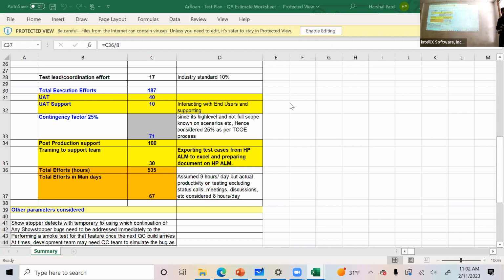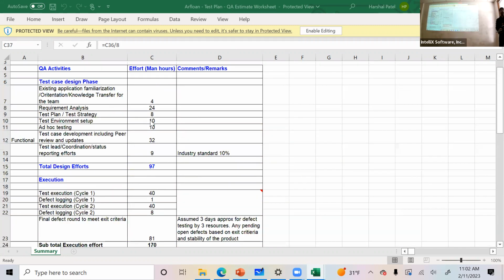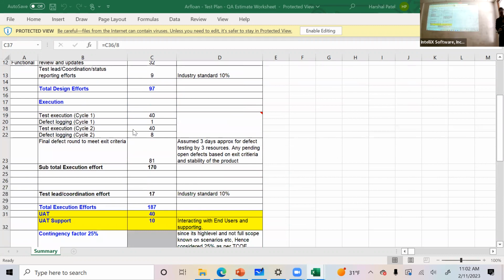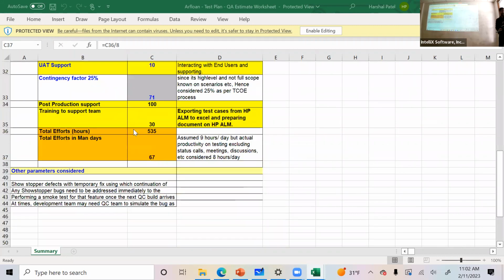And it may sometimes be as simple as, hey, for the design phase, I need 3 people working simultaneously. For the execution phase, I may need 4 people working to execute it quickly. Right? But this is the total effort needed. That's what you're going to charge them.